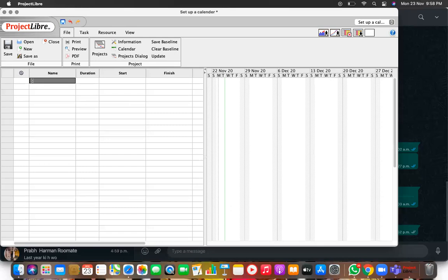I'll explain to you a 5-day task schedule, that is Monday to Friday, but the resource assigned to complete the task does not work on Tuesday. So the task itself has a standard calendar, but the resource would be assigned to a calendar that does not include working on Tuesday. Then Project Libre can schedule appropriately, and that task will finish one day later. Since Saturday and Sunday are non-working days on the calendars, that would actually finish on Monday.